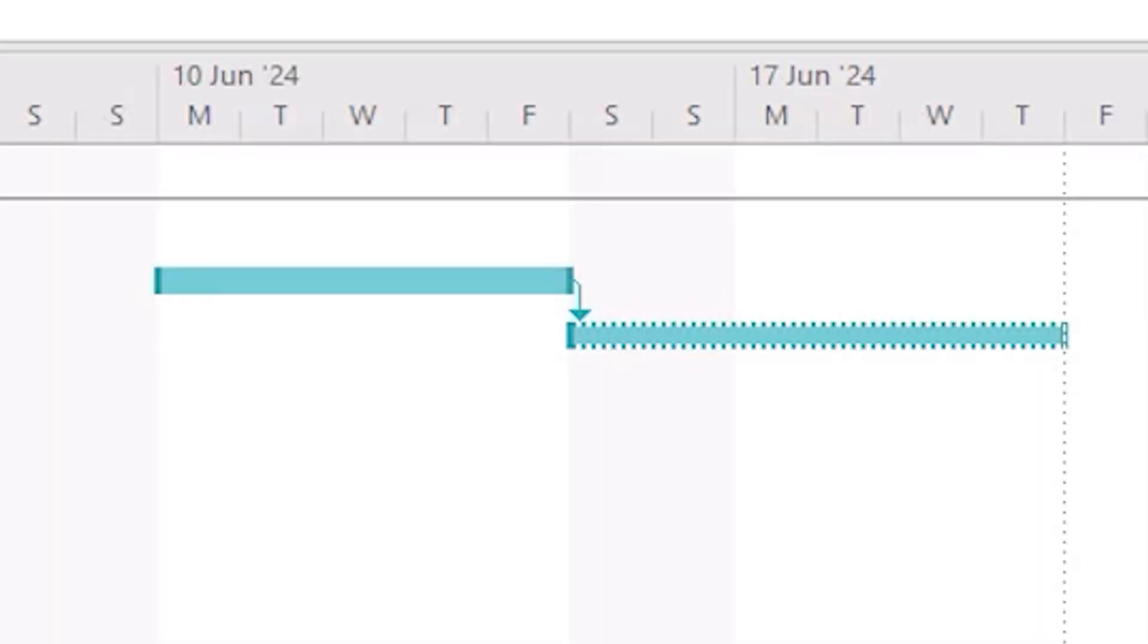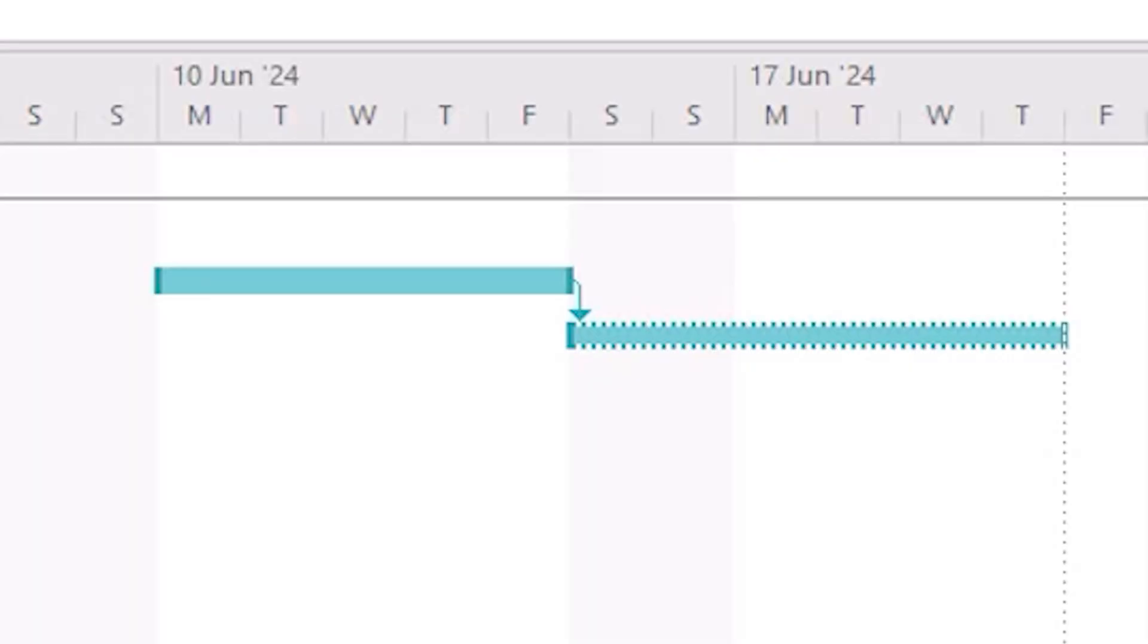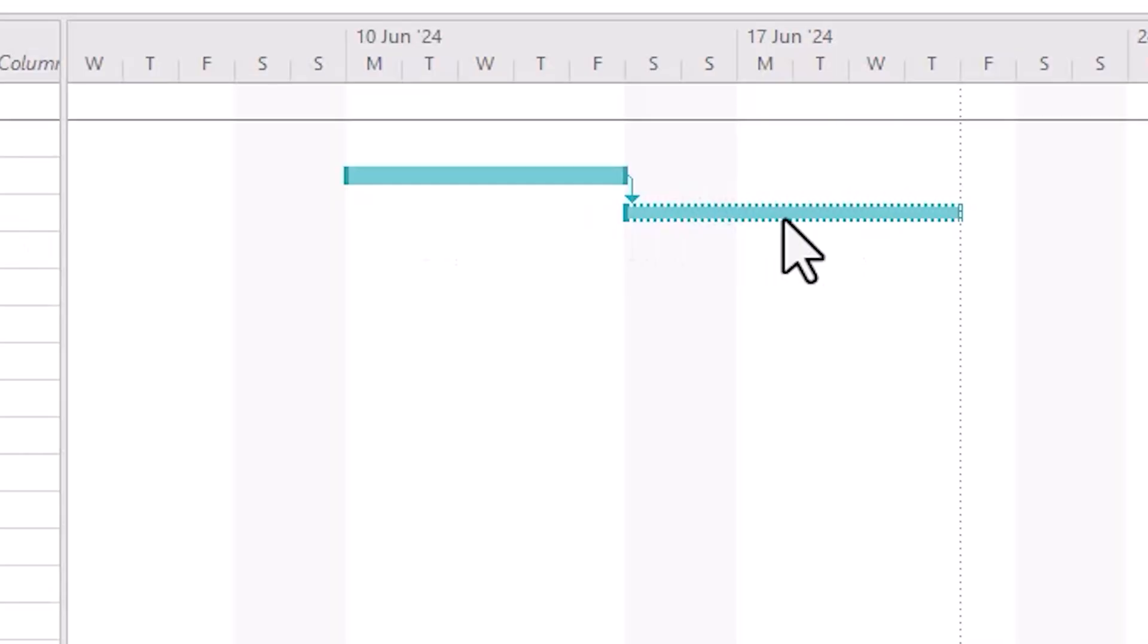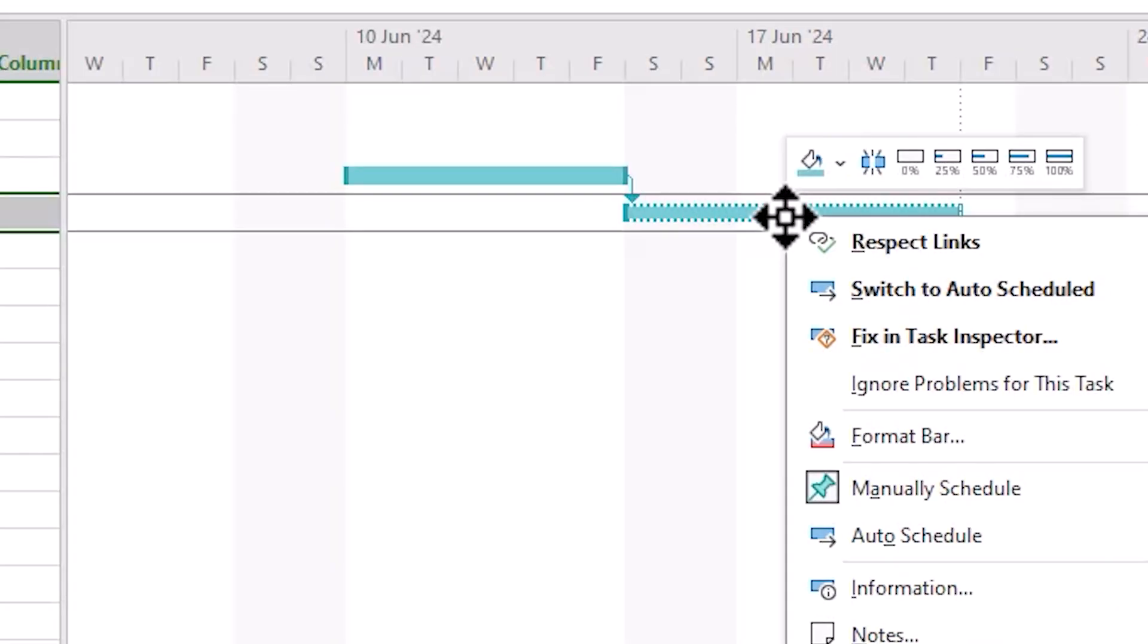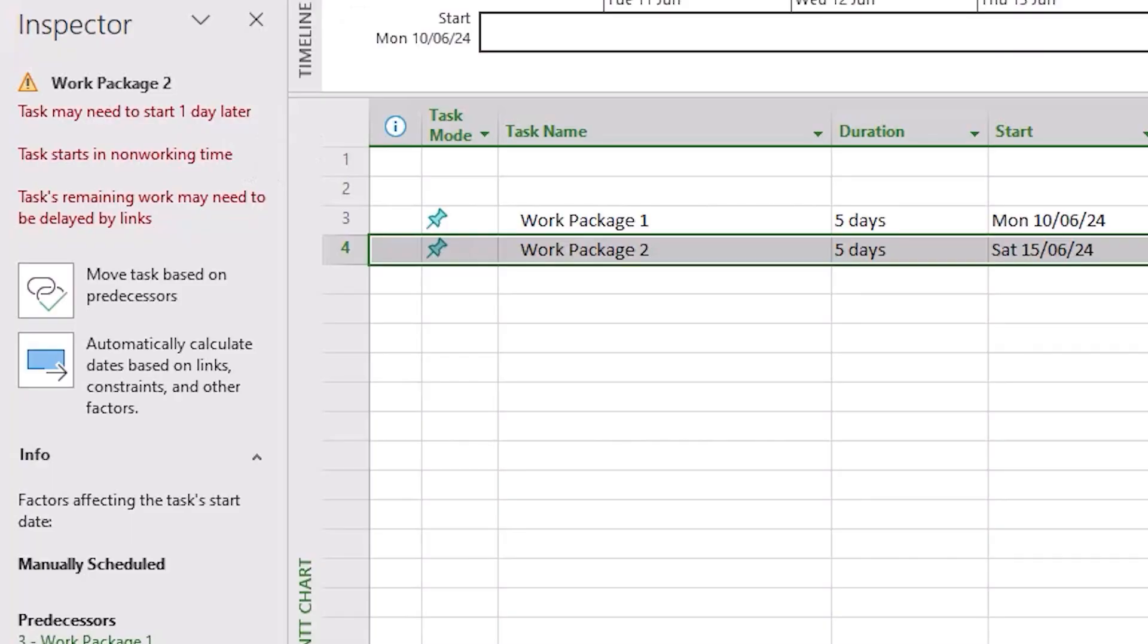For example, here it starts Work Package 2 during a non-working day. Why? Because it's manual and we told it to do that. We can tell there's a problem with the second task because of the dotted line around the taskbar. If we right-click we see a few options that will resolve the problem. I'll click the Fix in Task Inspector option. The Task Inspector notifies us of the problems here.